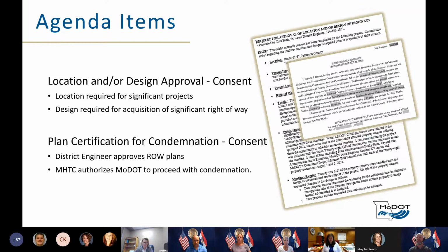So the location and design approval is a consent agenda item. To ensure the commission is not surprised by work on significant or controversial projects, it is MoDOT's role to provide details on these projects for their approval. This is done with a location and/or design approval agenda item. Location approval is required for projects that require an environmental assessment or environmental impact statement.